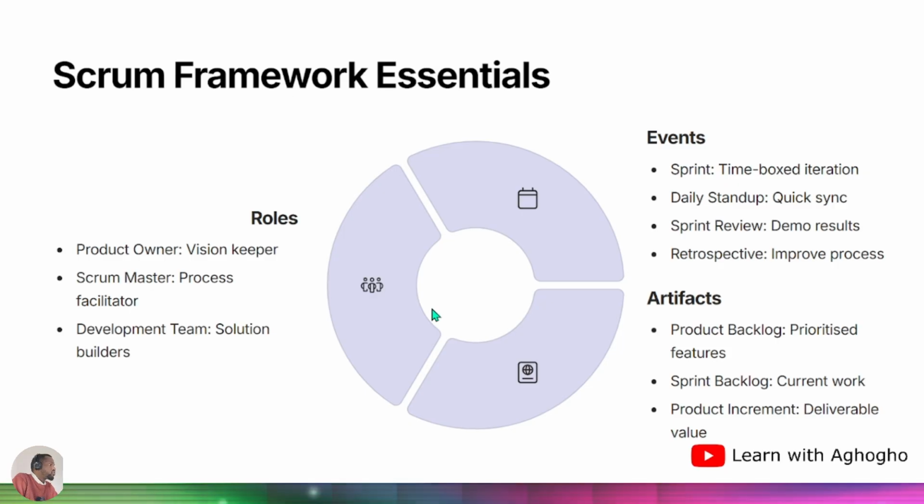You can have those for 15 minutes within your team to have a brief of what was done yesterday, what you intend to do today, and what blockers you faced executing your project. They are discussed and passed across to the necessary team through the Scrum Master.